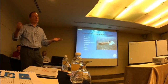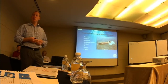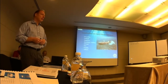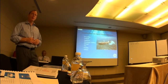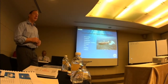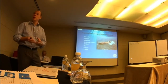Likely, if a vessel goes aground, it always goes aground on coral, pristine nature reserve, fishing grounds, and so there will be a lot of authorities or non-governmental organizations that very quickly come in, and that their livelihood has been affected, basically. That is almost without fail. So it's also sometimes very important to mitigate those aspects. Of course, the vessel needs to be dealt with and stabilized, but the elements forming the critical path in dealing with the incident might not always be with dealing with the vessel itself initially.